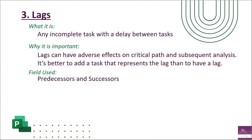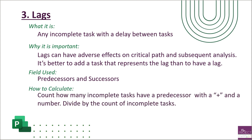The fields used to find this are the predecessors and successors fields. To calculate it, you count how many incomplete tasks have a predecessor with a positive plus sign and a number, then divide that by the total incomplete tasks. DCMA permits at most five percent of your tasks to have lags.